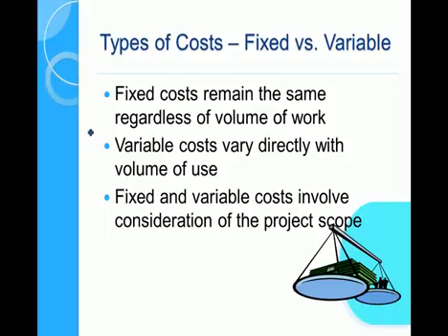Don't forget, you've also got your project scope. So the meetings, the reporting, the gaining approvals, all those other things actually do cost the project money. So it's not enough to just cost out digging holes. You also need to think about the reporting requirements, the management requirements, so the project scope.